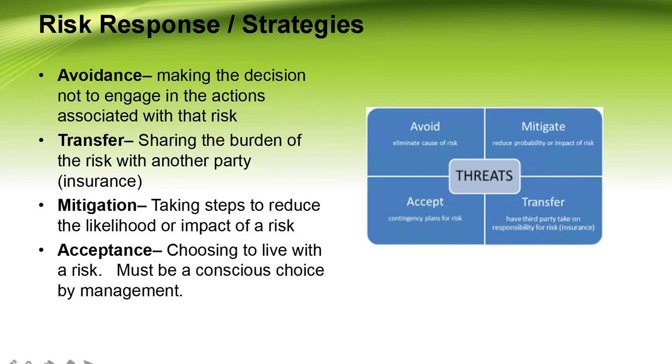Mitigation. So, mitigation or deterrence: risk mitigation involves reducing the likelihood or impact of risk exposures. Risk deterrence involves putting into place systems and policy to mitigate risk by protecting against the exploitation of vulnerabilities that cannot be eliminated. Most risk management decisions focus on mitigation and deterrence, balancing the cost of risk against the level of risk and mitigation that will result.